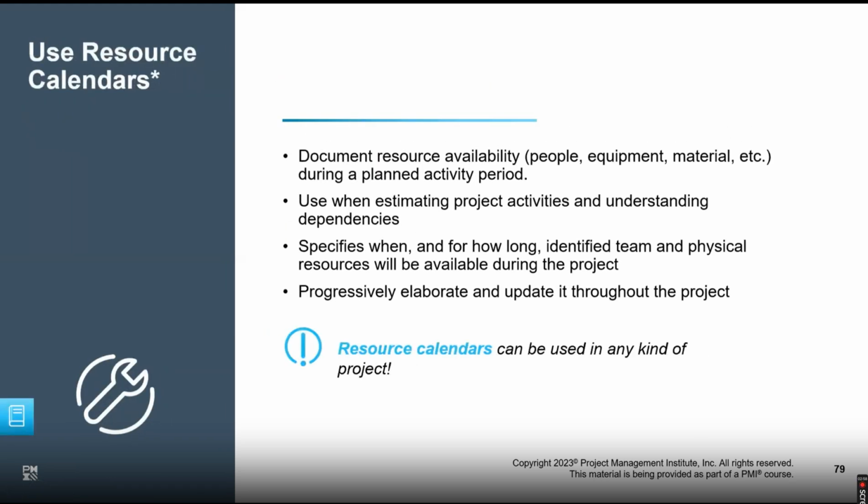So while you're going to give responsibilities to people, you need to have a resource calendar. What does a resource calendar do? It helps you to understand the availability of resources. So if you're going to get resources within the organization or you're going to procure from outside, bottom line, I need to see the resource calendar, which tells me the availability of the resources. Because according to that, I can assign responsibilities. So if I have to give responsibilities to people, I need to know whether the responsible resource will be available to perform that task or not. So again, I have to look at resources.